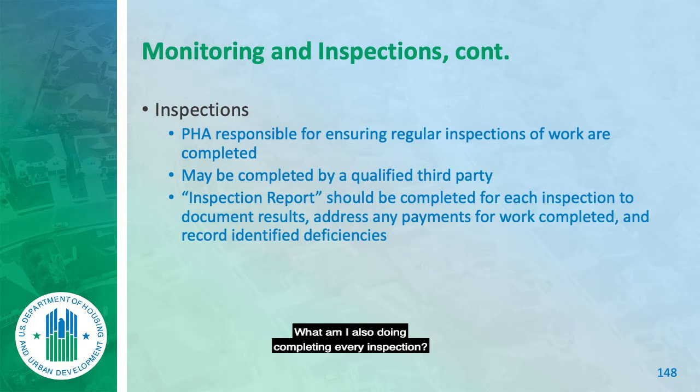What am I also doing, completing every inspection? Construction log. A binder where I wrote all the construction things that they were doing right while they were doing it. Each day I would record stuff, including weather. Why weather? Well, they're always looking for rain days. May or may not have given them to them, but that's what they're looking for.